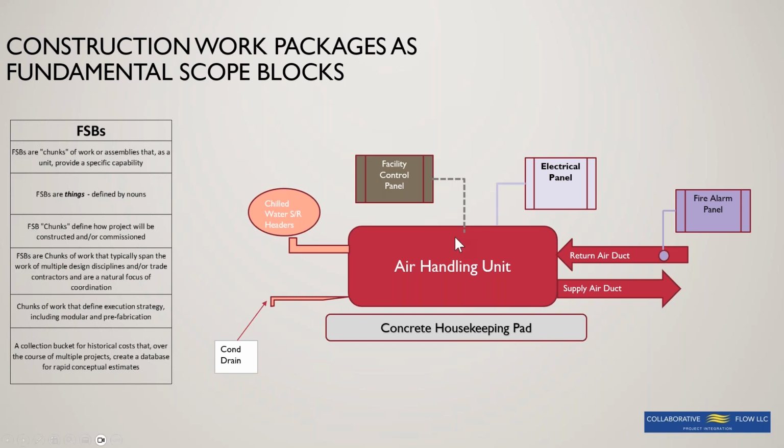And so this would represent the fundamental scope block. Without all these things done and complete, no one can use the air handling unit. It doesn't do any good to have all but one of these things done. You can't start up the air handling unit. So this is about getting everyone to visualize it. These activities that connect it are called scope activities.